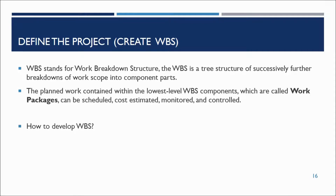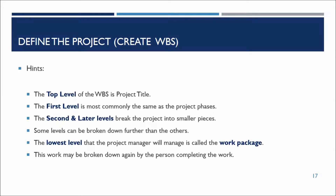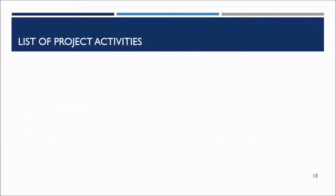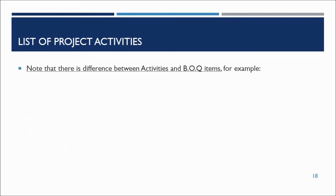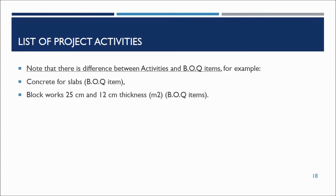To develop a work breakdown structure, you can search for templates or decompose the project into smaller, manageable parts. The top level of the WBS is the project title; the first level commonly corresponds to project phases; subsequent levels break the project into smaller pieces. The lowest level the project manager will manage is the work package, which may be broken down further by the person completing the work. Note that there is a difference between activities and BOQ items. For example, concrete for slabs can be divided into activities such as shuttering, steel reinforcement, and pouring, or divided per floor. However, blockwork of 25 cm and 12 cm thickness can be consolidated into one activity. BOQ can assist in developing the activity list.